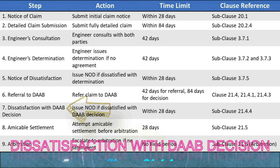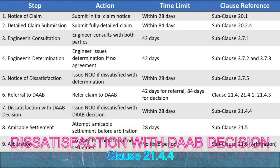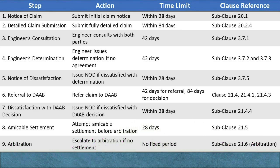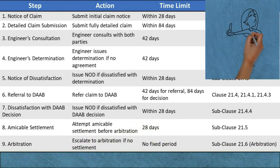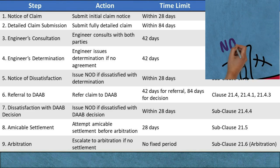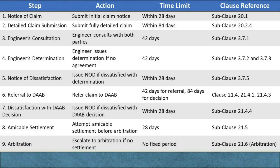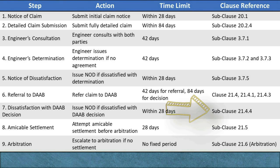Step 7: Dissatisfaction with DAAB's Decision (Subclause 21.4.4). Action: If either party is dissatisfied with the DAAB's decision, they may issue another Notice of Dissatisfaction with the DAAB decision. This notice must clearly state that it is a notice of dissatisfaction with the DAAB's decision, along with reasons for the dissatisfaction. Time limit: This notice must be issued within 28 days of receiving the DAAB's decision. If no Notice of Dissatisfaction is issued within this 28-day period, the DAAB's decision becomes final and binding. Clause Reference: Subclause 21.4.4.